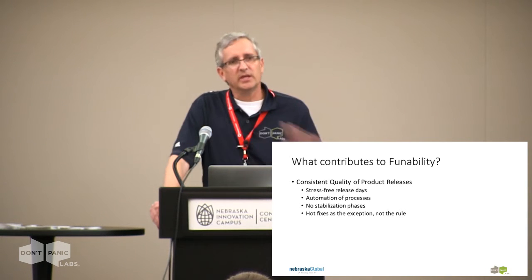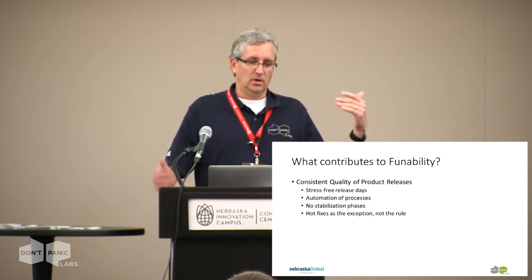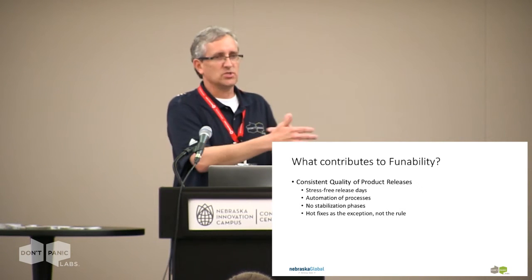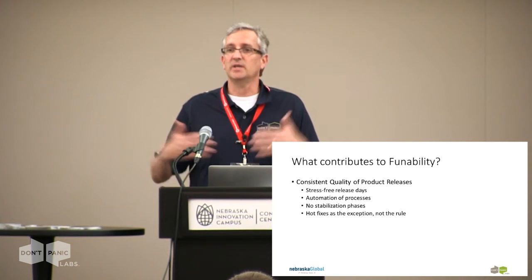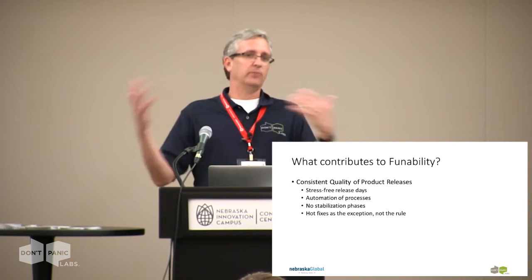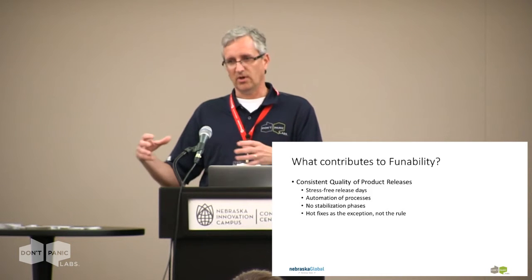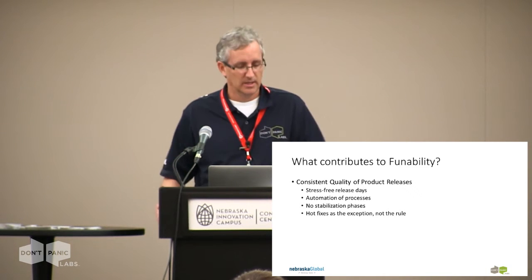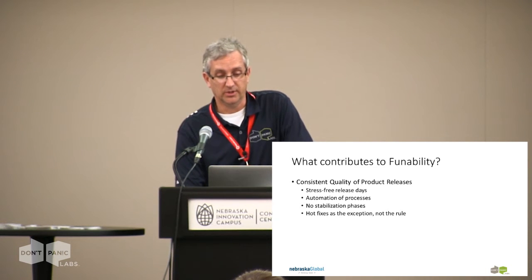And then the second part of this is, have you ever gone on some sort of a march to create a feature set for a release and you're like, we're feature complete this week, and it's yet another four weeks before it actually got released? That's what we would call the stabilization phase, where you spend all this time making sure we've done all the feature development, and now we're just trying to make everything work together. That is also a huge impact to predictability.